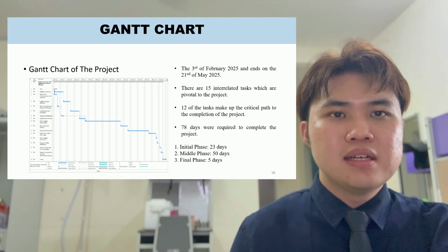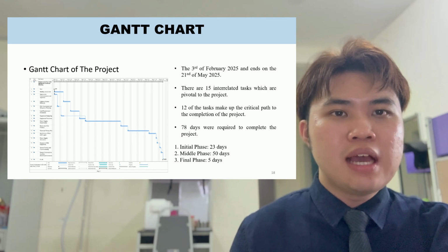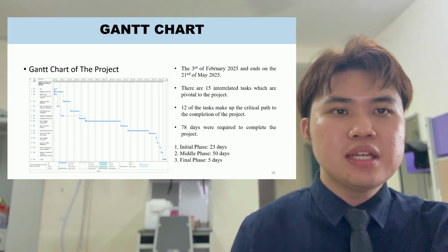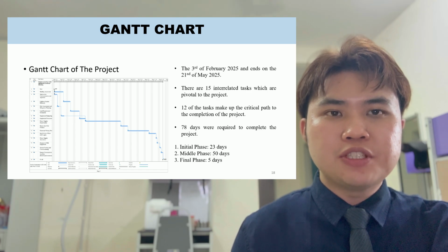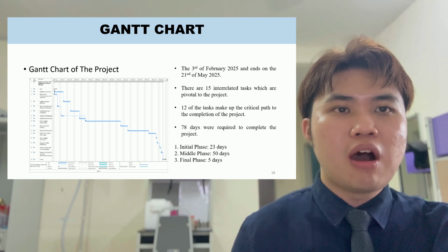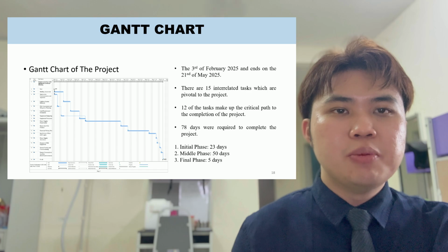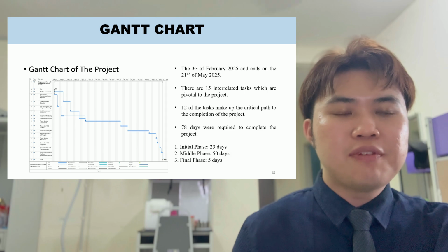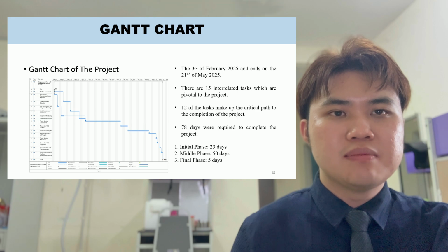milestones. The building assessments, redesigning layouts, calculation of load requirement, budgeting, and equipment purchase that were part of the initial phase took an estimated 23 days in our project timeline. Shutdowns of the power supplies, removal of outdated fixtures, wiring works, and putting in LED light fixtures required a calculated duration of about 50 days at mid-phase. The last step was switching on the supply, removal of the old system, and checking the new system of LEDs. That too was around 5 days or so. In all, 78 days were taken to finish this work.